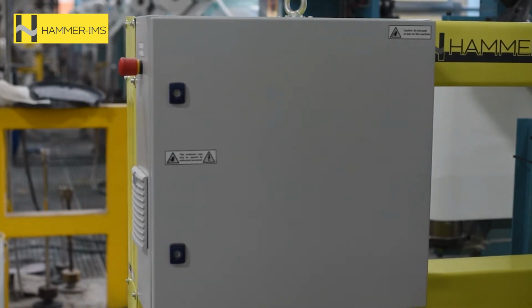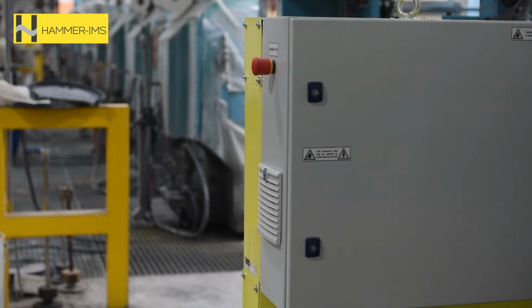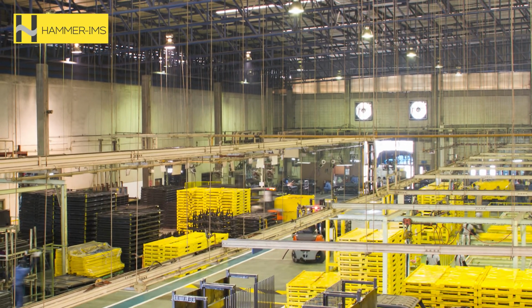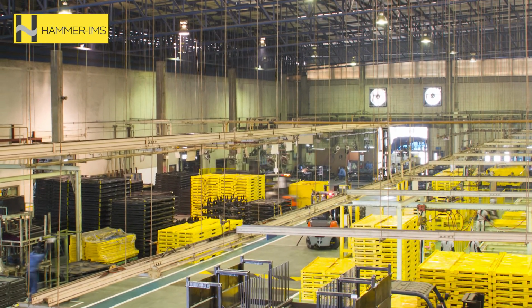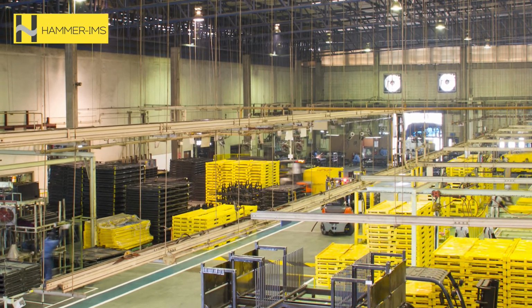In the factory at the customer, the right tools and sufficient space were available to allow for smooth machine positioning and installation in the production line. Everything took place on the ground floor. No height differences were needed to be bridged. People from the maintenance department operated the hoist crane and helped with anchoring the machine in the concrete production floor.